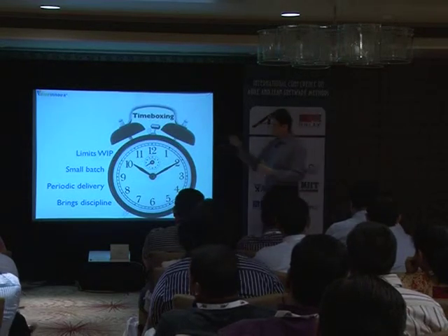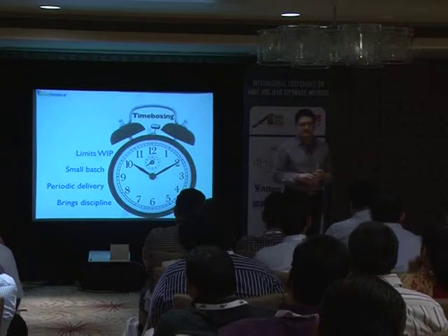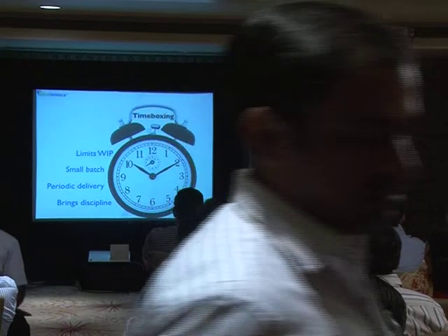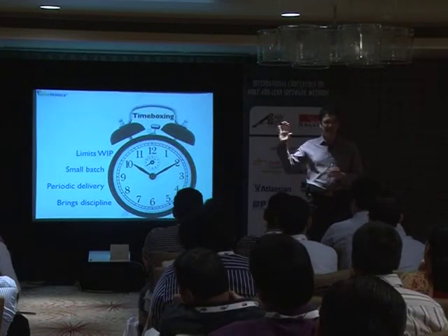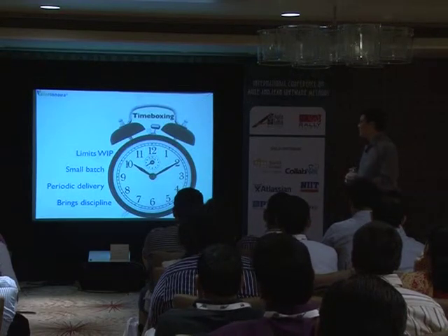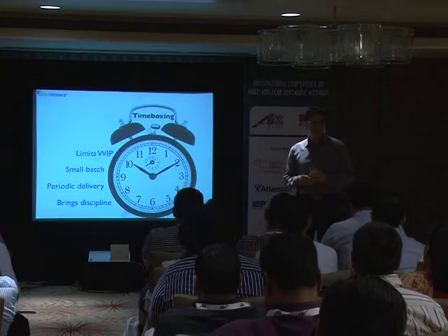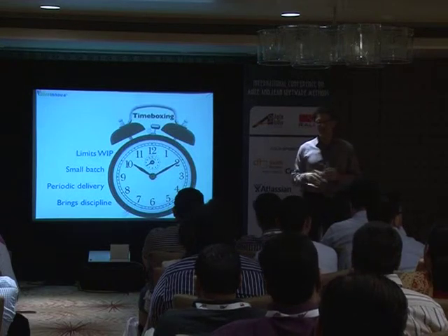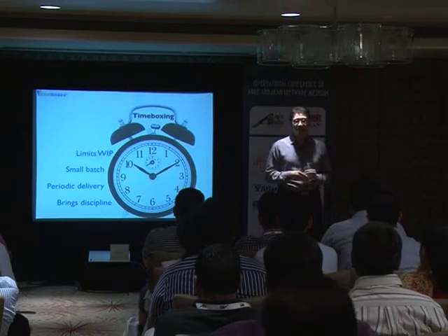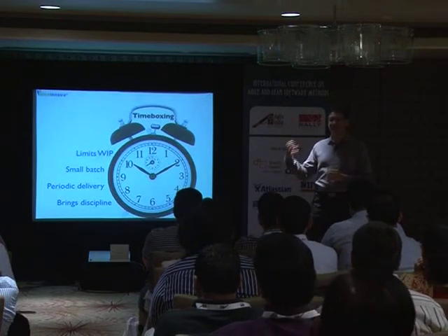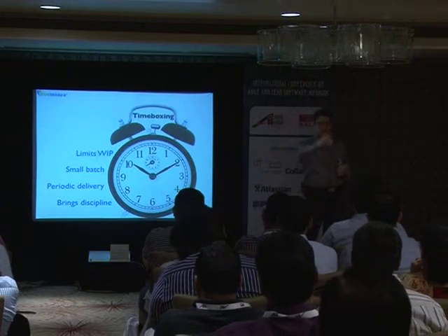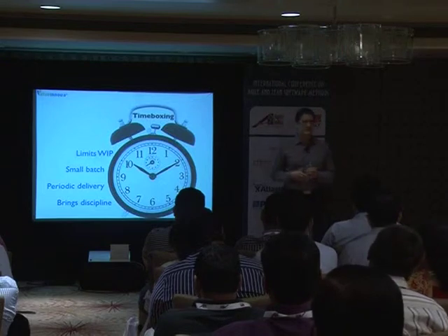Well, what we have to begin with is WIP limits. And some people say, wait a second, Masa, WIP limits have nothing to do with Scrum, for example. That's a Lean or a Kanban thing. In Kanban you have WIP limits, but you don't have that in Scrum. And that isn't true. We actually always have a WIP limit with Scrum. We just don't call it that. The WIP limit is the number of tasks, or the number of user stories, that we have on our sprint backlog at the beginning of the sprint.